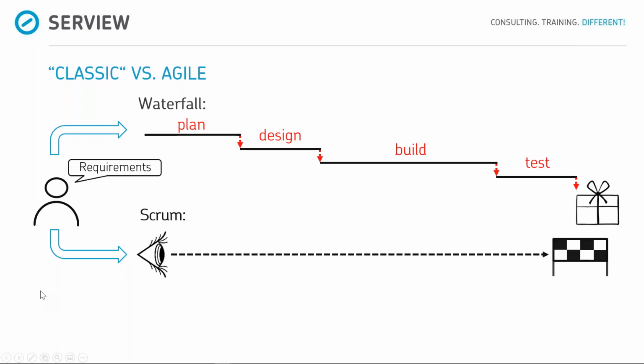But we know changes are going to come, and we do not have all of the requirements put down in detail. So we can't sit down that long on our own. At some point, the customer is going to have to come back and talk to us about the product. So we will take a piece of time that has as little risk of change as possible. And in Scrum, we say this is a maximum of 4 weeks or an equivalent of a month.